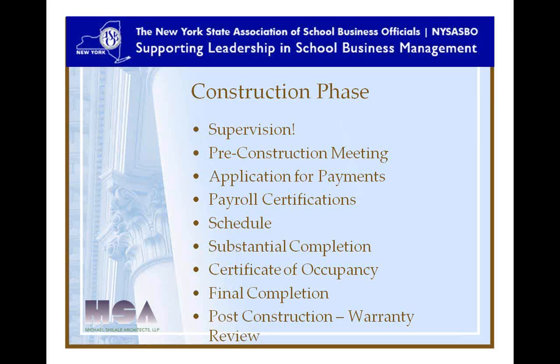For some other retail clients, we've actually had $5,000 a day liquidated damages, and it works. It does increase your construction costs a bit because contractors try to put in a bit of a cushion when they bid, and they know there's a liquidated damage in the contract. But if you need a classroom opened by September, then that's really the only way to guarantee that it'll be there on time.